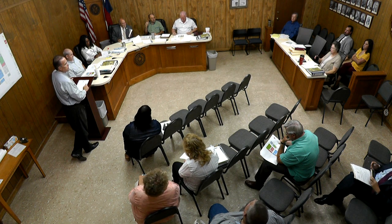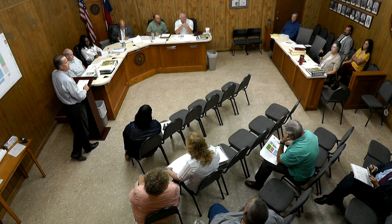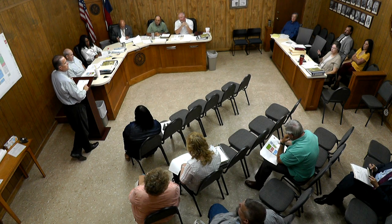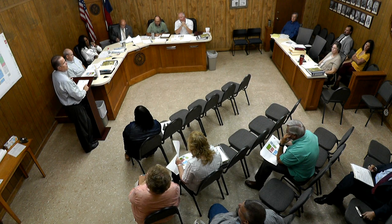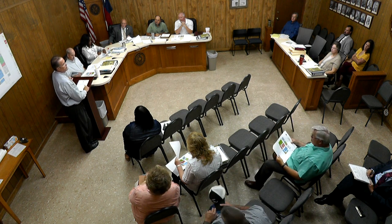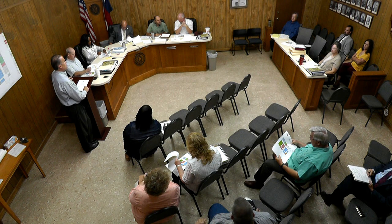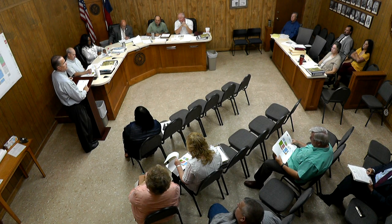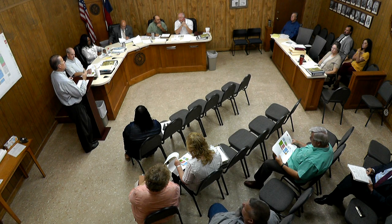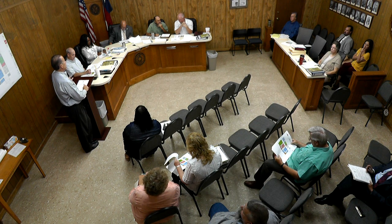These dollar amounts per square foot, does that include the furniture, or is that just the building? That includes the courtroom, built-in millwork, and courtroom furnishings. It doesn't include the furniture for all the departments. In the next phase, we can budget that for you if you want to say which departments need new furniture and which don't. We can help you through that pricing.